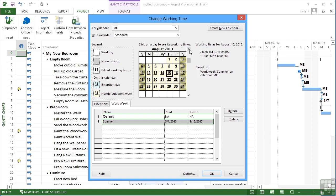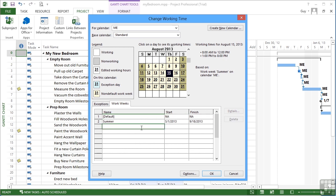So if you need a different set of working hours, it may even be for one week. This person can suddenly be available for extra hours during one particular week. You would add that in as an extra option to the default. And then the default is assumed when none of the other date times are applicable. And you can see here, you could add in quite a few different variation work patterns for different date ranges.